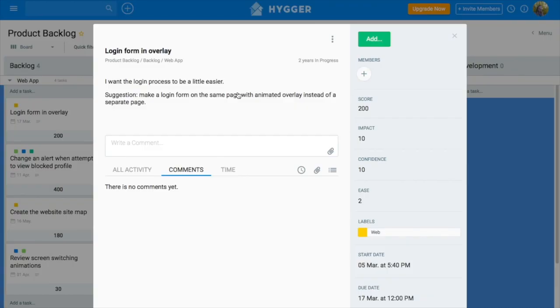Each criterion is rated from 0 to 10. Then multiply impact and confidence by ease and you'll get the final score. The higher the score, the more valuable the task is.